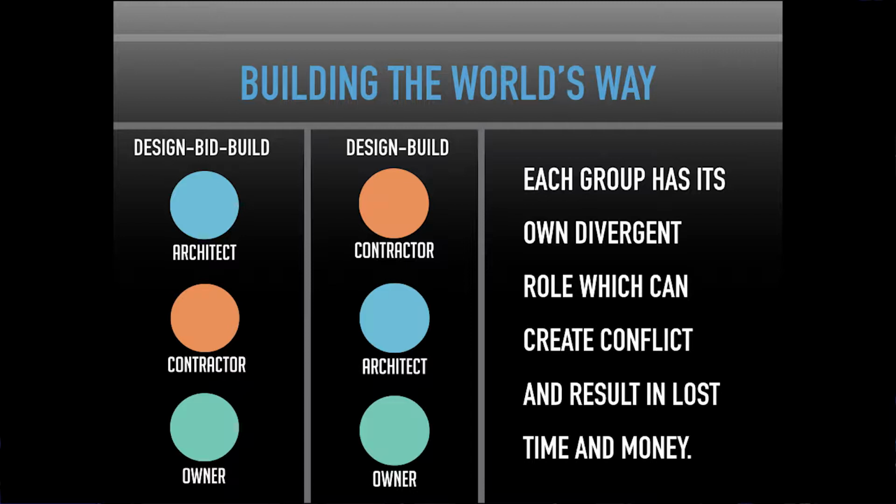And the architect's thinking, well, this is a much bigger project than $2 million. This is a $4 million project if I ever saw it. But I'm going to design it to their needs because they're telling me what their needs are. So these projects get over-designed. They get way down the road. Well, oftentimes what happens is then the architect goes into the construction drawings and gets the drawings done.